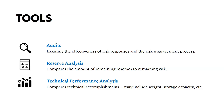Reserve analysis involves comparing the amount of remaining reserves — how much is left in the contingency budget — against remaining risks, to make sure the project stays on track. Technical performance analysis compares technical accomplishments and may include metrics like weight, storage, and capacity.